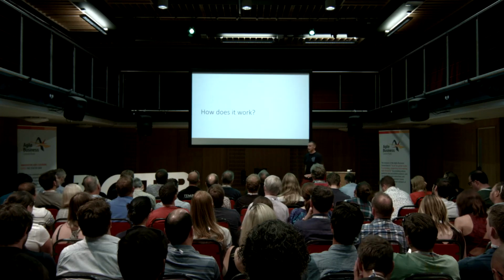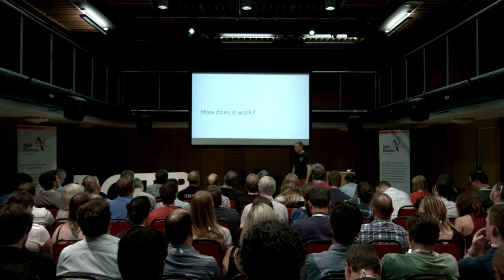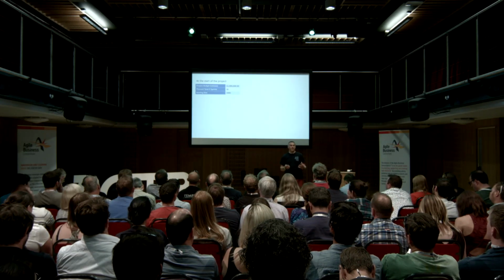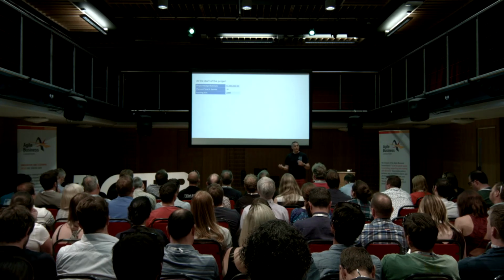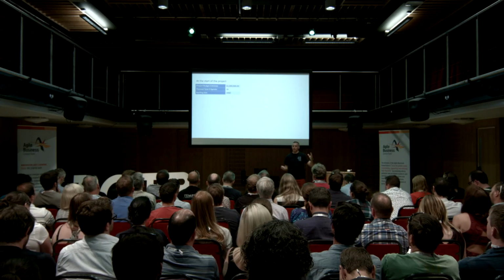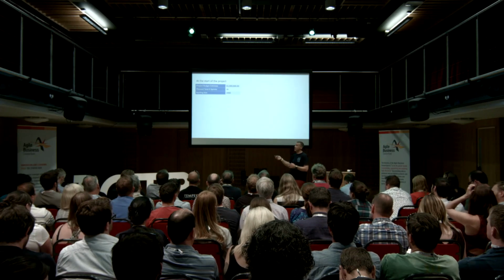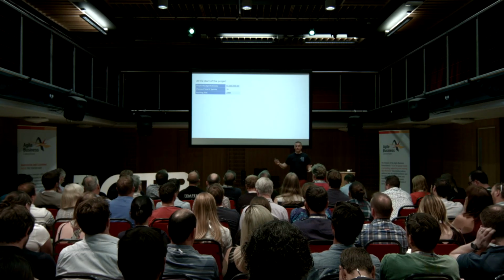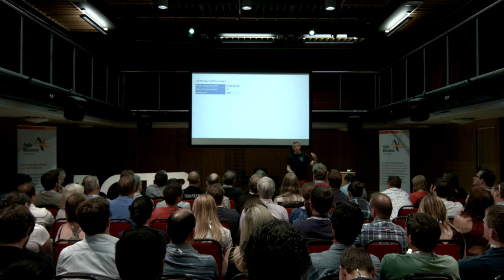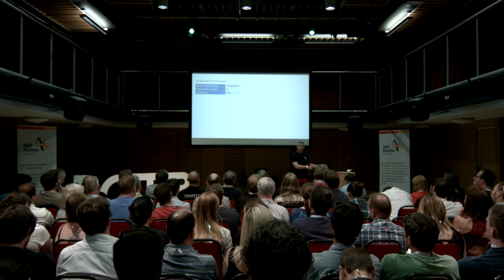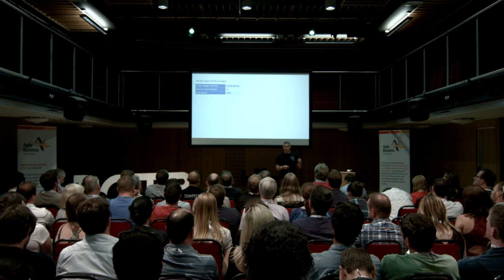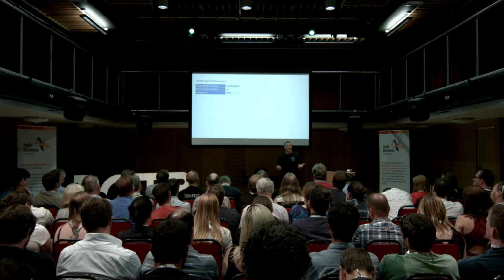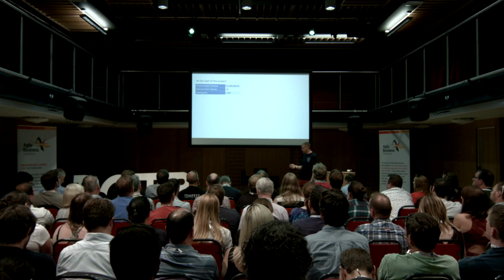So let's look at how this actually works in practice. There's a bit of work to do at the start. In order to calculate your earned value, you need a baseline of what you think the project looks like at the start. You need to estimate how much work you think is in this project in points. You can use evidence-based forecasting if you've got historical data for your team, or you can sit in a room with some of the team and do your best guess at how much work there is. But you need a starting point.